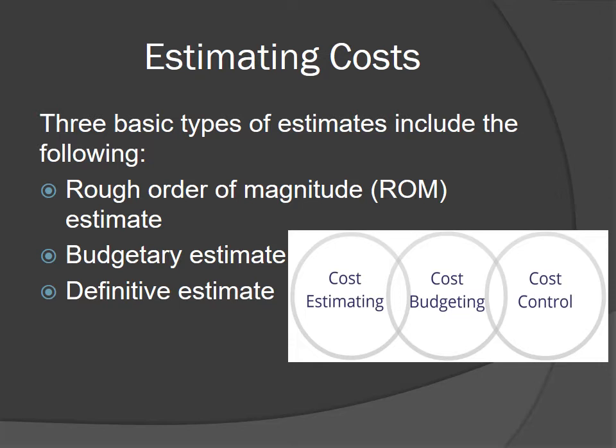There are different techniques used for estimating costs. There is no one-size-fits-all method to estimating costs, and therefore it is important to analyze and react to each project appropriately. If a similar project has been completed in the past, an analogous estimate may be appropriate. This technique estimates costs based on the cost of another similar project. If the project is much different than any others completed, a bottom-up estimate may be more useful. A bottom-up estimate estimates costs based on activities required and builds up to completion, summing the cost for each activity.